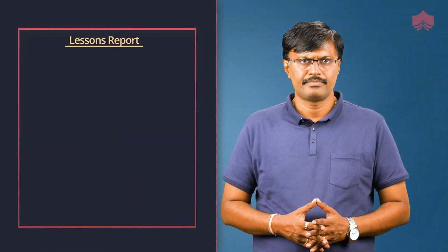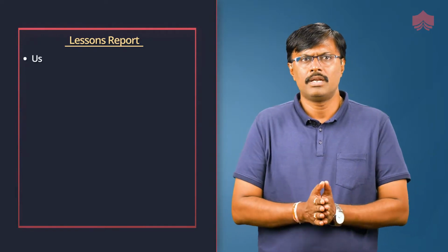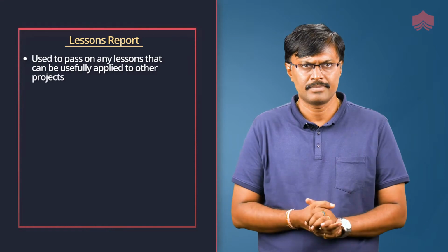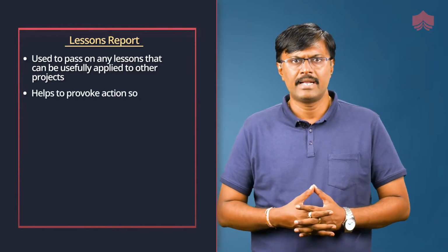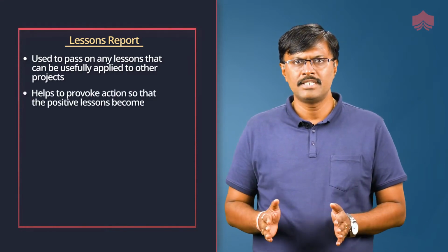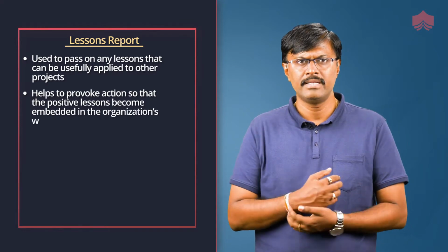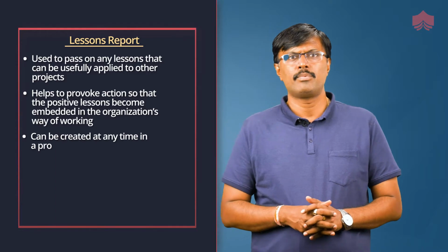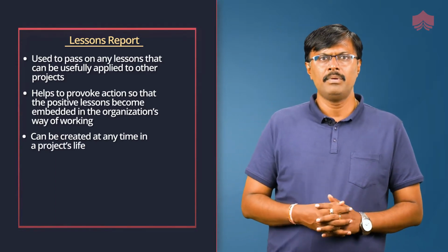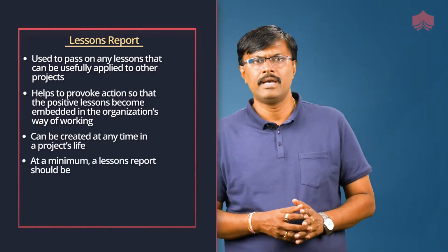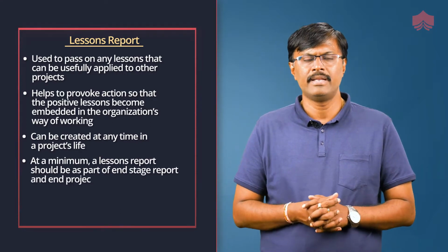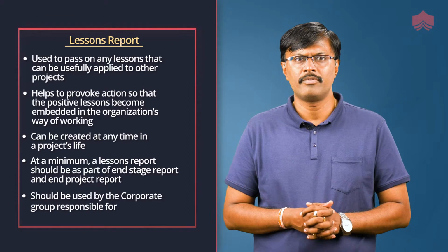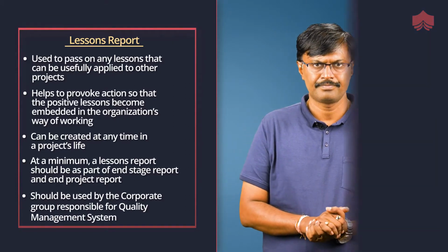Lessons report. Lessons reports are used to pass on any lessons that can be usefully applied to other projects. It helps to provoke actions so that the positive lessons become embedded in the organization's way of working. It can be created at any time in the project's life. At a minimum, a lessons report should be produced as part of the end stage report and end project report. It should be used by the corporate group responsible for the quality management system.